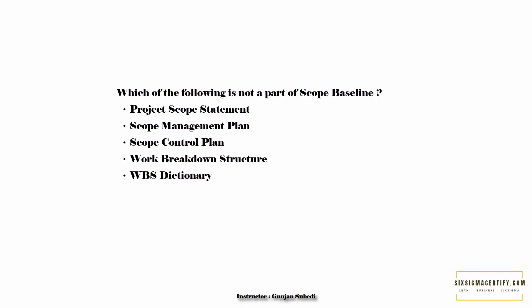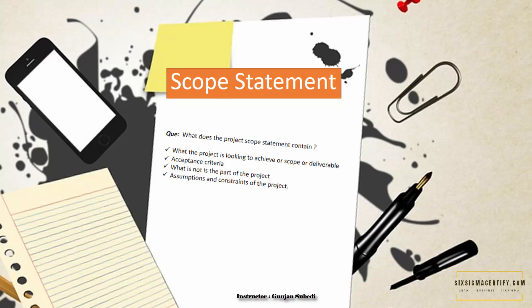We learned about different components of the scope baseline, with the scope statement being one of the major components. The project scope statement contains information on what the project is looking to achieve, the deliverables, acceptance criteria, what is and is not part of the project scope, and also assumptions and constraints of the project.